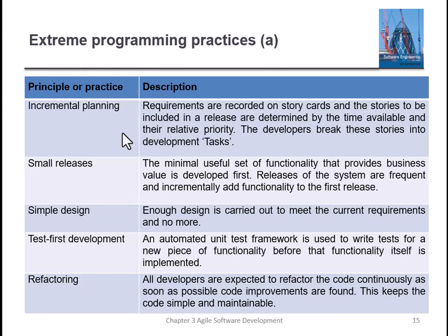The developers break these stories into development tasks. This means the stories come after negotiation and discussion with the clients and customers, communicating on different features, and you must map these stories into tasks. The task minimum duration should be nearly about 10 to 14 days.